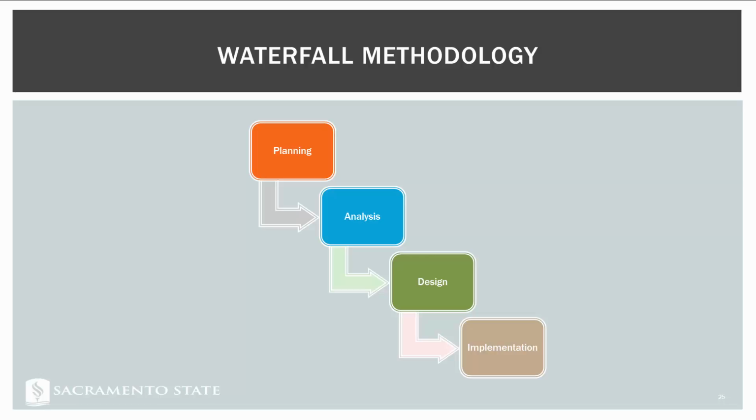Now, this works well if your project doesn't have to be changed halfway through or has requirements that need to be changed part of the way through. But if there's change that needs to be thrown in, this process really doesn't work very well because you'd have to go all the way back to the beginning and replan and analyze and redesign, and it just is not very forgiving for changes in requirements.